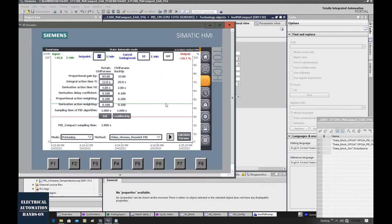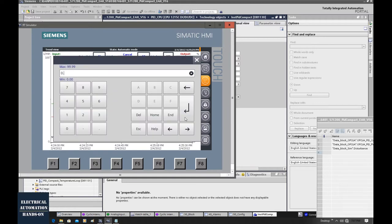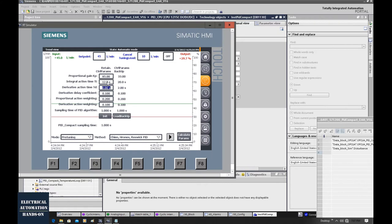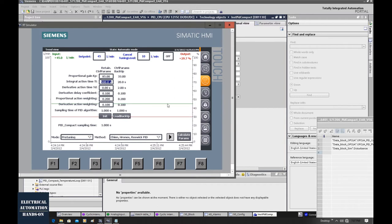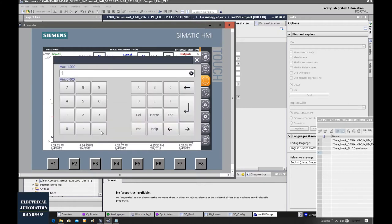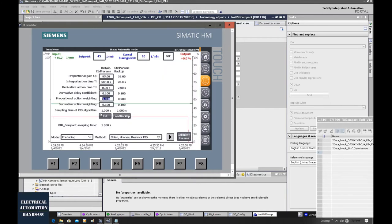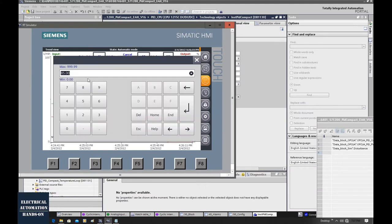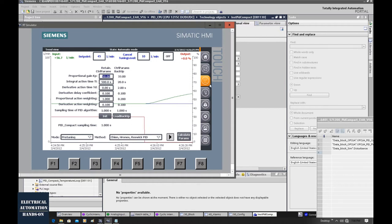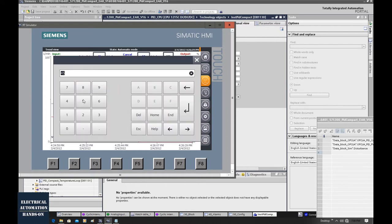Firstly, to allow this PID controller to run with KP gain only, I need to give zero on this derivative — set to zero. And for the integral, I will set a very big value; basically this big value will eliminate the integral effect. And to allow this KP to work, keep in mind for this proportional action weighting, I will set it to one. After this setup, the sample time of the PID algorithm is one second, and the PID control mode is auto. Let's give a small value and gradually increase this KP. First, let's set 50. Then change to a new setpoint near the operating point of your system — just give a new setpoint and let the system adjust the process by itself.